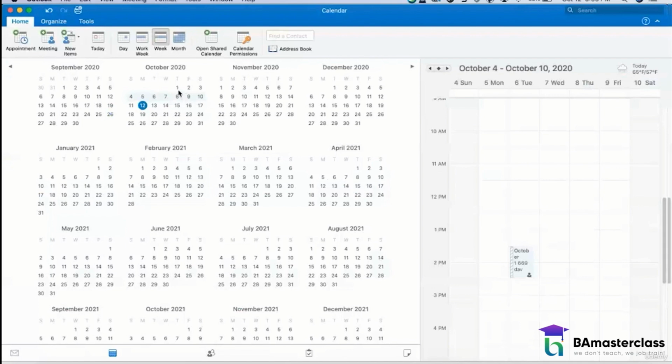So let's say I'm starting up my Agile project in October, my first day is October 1st, and my release should be on a Wednesday, and it's a 2-week sprint. So my first 2-week sprint is Thursday, October 1st to Wednesday, October 14th. My second sprint is October 15th to October 28th.